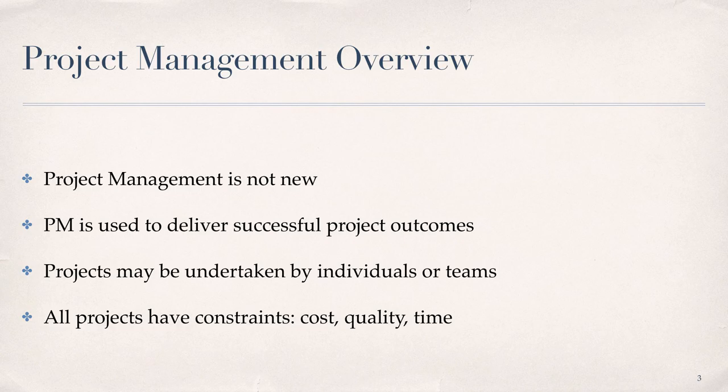In software development, there's an old saying: you can have it fast, good, or cheap — pick two. The professional practice of project management requires proactive and ongoing risk planning and mitigation to deliver outcomes that are on time, within budget, meet quality standards, and deliver on interim project milestones through effective and efficient use of project resources. Project constraints are all interdependent within the project plan. For example, a change in scope may pose new risk to cost, timing, and quality. Similarly, a change in timing in one task may make a critical resource unavailable, leading to an overall slip in a key deliverable schedule.